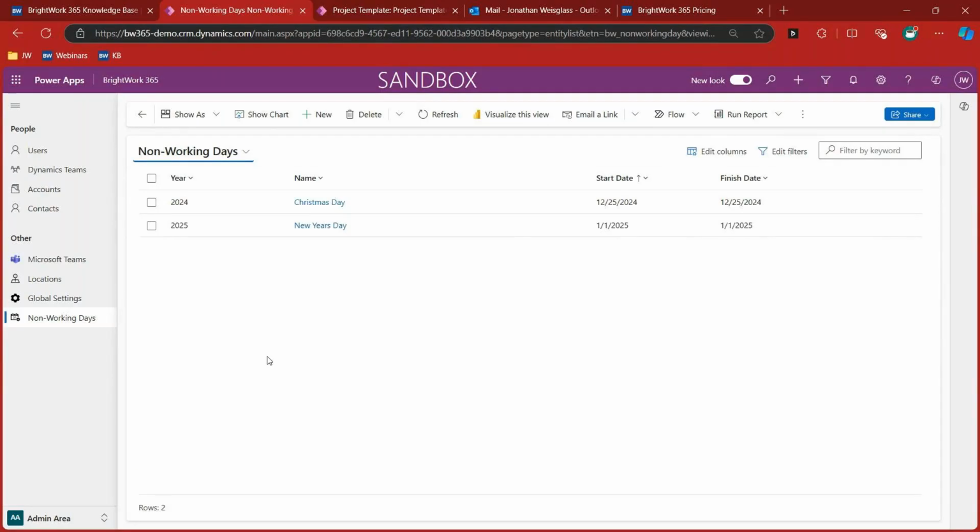So you might have a global setting of Monday through Friday, but of course, there's going to be specific Mondays and specific Tuesdays and Fridays, etc., where there's globally in our organization no work being done. We can very easily click on new and create new non-working days. And those again will have the effect on a Gantt chart, for example, and work assignments that you would expect them to have. So that's create a new project. These are automatically applied. You don't have to think twice about it.